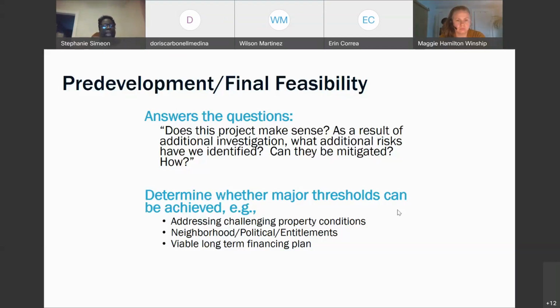So just like I said, we had vacant lots, vacant properties that were donated to us for CHDO activity, which is community housing development, single family homes from the Department of Justice. Once we did further investigation, we saw that one of the houses had some illegal dog fighting. We found human bone. I mean, you name it, we found all these things. And it's like, oh, we need to clean this up before we can do that. This is full of lead, lead abatement, and asbestos.